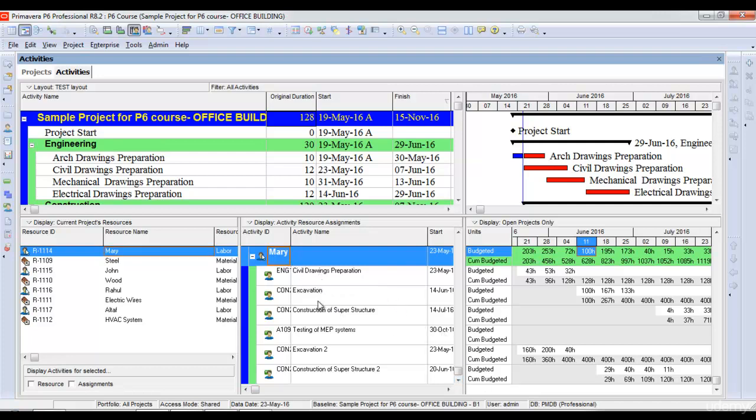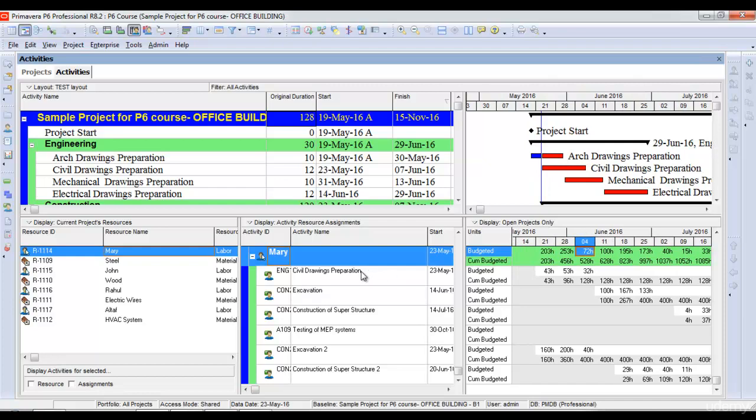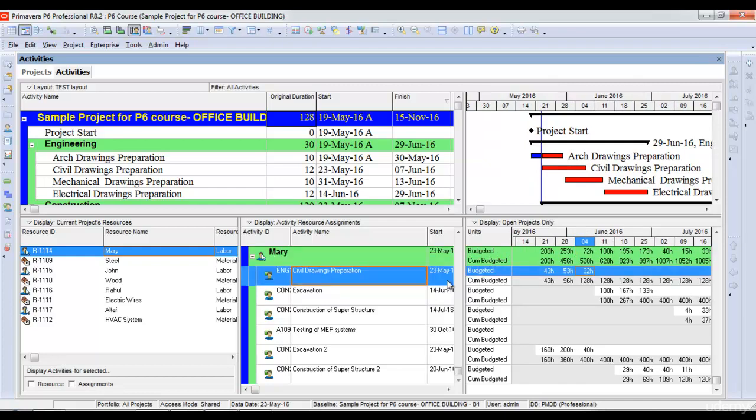Mary is assigned to all these activities. It shows me her assignments per month or per week as per the time scale I have selected here. For example, Mary is assigned to civil drawings preparation, and for civil drawings preparation her budgeted units in these weeks are 43 hours, then 53 hours, then